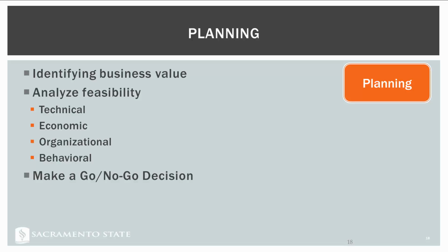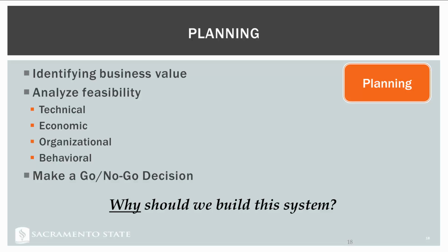One of the outcomes of our planning phase is we make a go or a no-go decision. Are we going to go ahead with this project or not? That's one of the deliverables of this phase. And again, why should we build this?